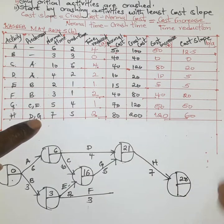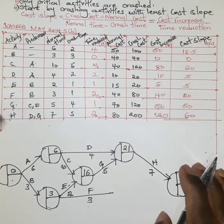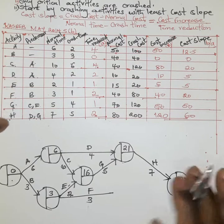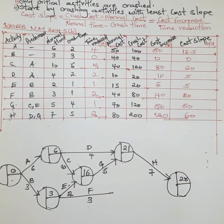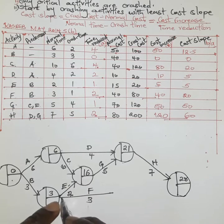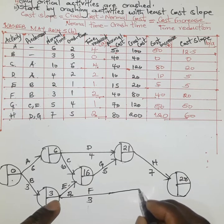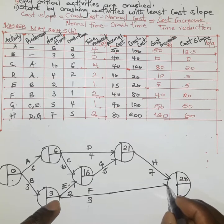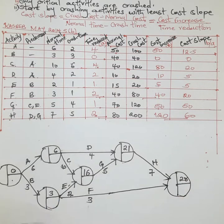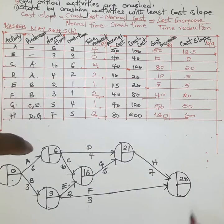An important rule is that there should be no danglers — activities without an ending node. Activity F is a dangler, so we connect it to the final terminal node. This completes the forward pass.